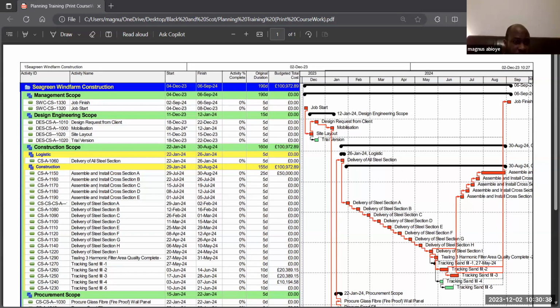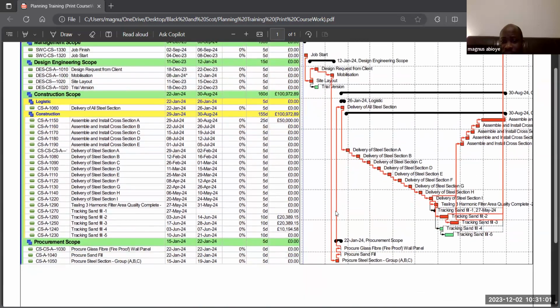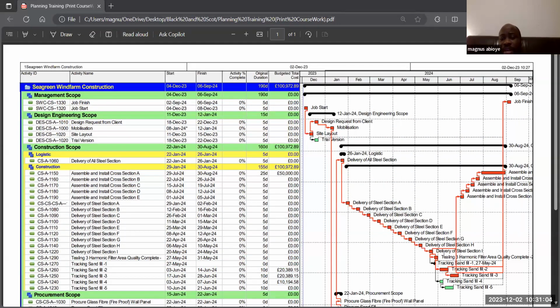Before submitting to the client, I look at everything. Okay, it's readable, it's feasible, the dates, the amount is there, commercial wise, the total budget is what we agreed on. Duration, I put D because I want them to see it's 25 days. Percentage, I'm okay with that. I don't want anybody to query me on anything. So I'm looking at everything relationship wise. I can look at all the activities. They have all the relationships. I'm showing the critical path and how the critical path affects the final date. And I've also shown the summary. And this is what I want everybody to see with what I have done.